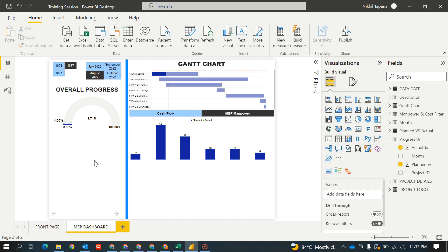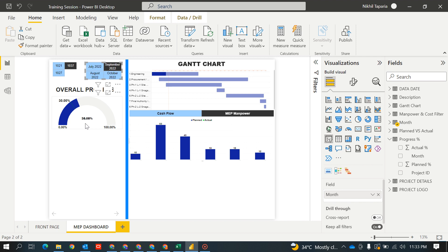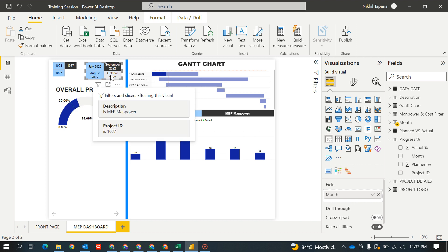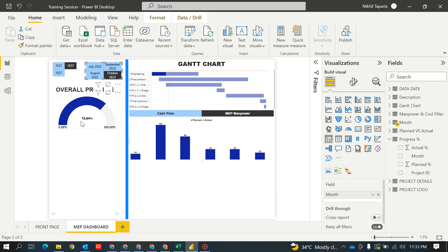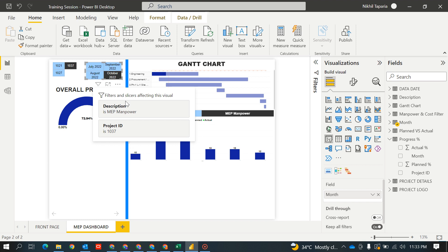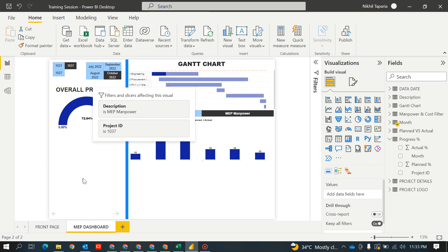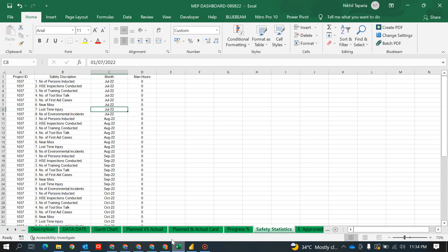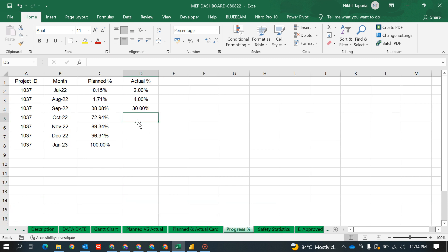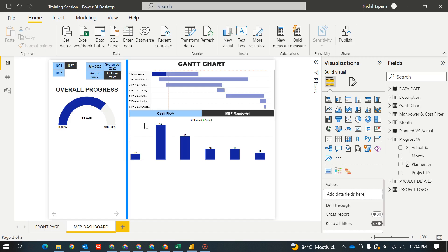This is our planned versus actual overall progress. In the month of August this is the cumulative planned, this is the cumulative actual. In the month of October, this is the cumulative planned, and the actual should carry forward from September if we have not achieved anything. But I didn't keep the values in the Excel so it's not coming — that's okay. If I keep the same value here because I didn't achieve anything, it will come through.